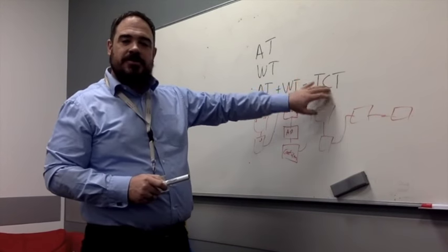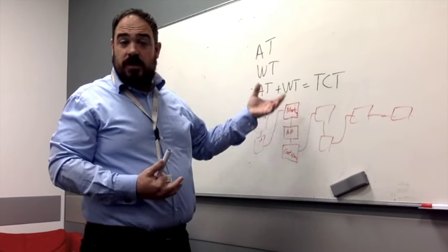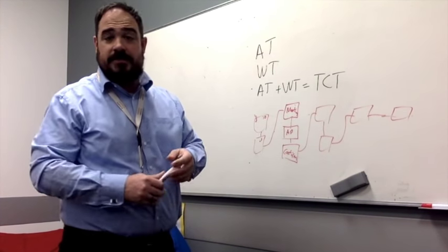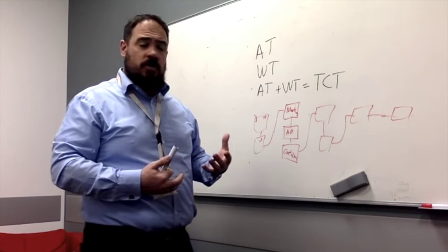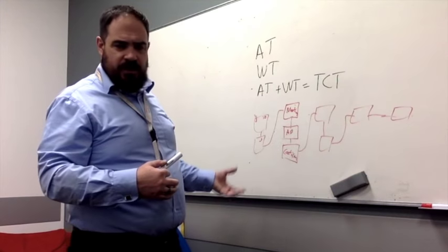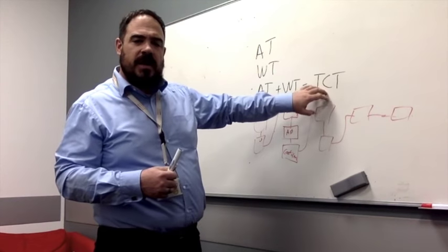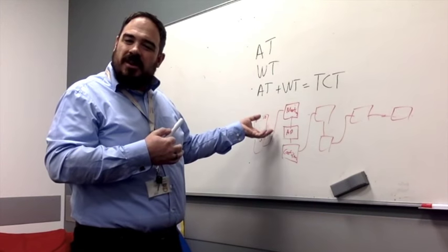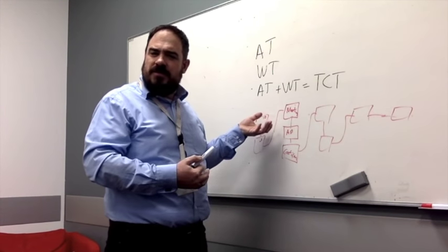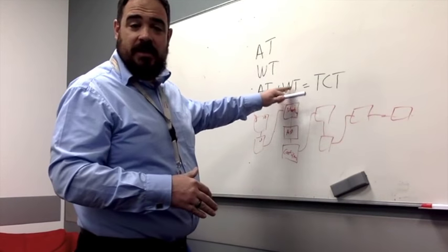If we look at the total cycle time, when you add that together, does that feel right? So for whatever activity or request we're looking at, if we come up with something that takes 6.5 weeks, does 6.5 weeks feel like the right amount of time? Or if it's something like resolution of a Sev 1 and we come up with 4.5 hours, does that feel like the right time? So that's a quick way to sanity check your estimates. Am I really taking 10 minutes for this? And we can start to make corrections on our wait time and our activity time based on our gut feelings. So that's how we can calculate the whole lead time here.